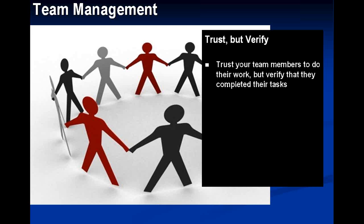Determine if your team members need assistance to complete their task. If a team member cannot complete their task on time, then determine if the reason is schedule-related or skill-related. Work with their manager to prioritize their projects or find another resource to help out. Ask your team members for potential scheduling conflicts or if they have time out of office scheduled. Build contingencies for this into your project schedules.